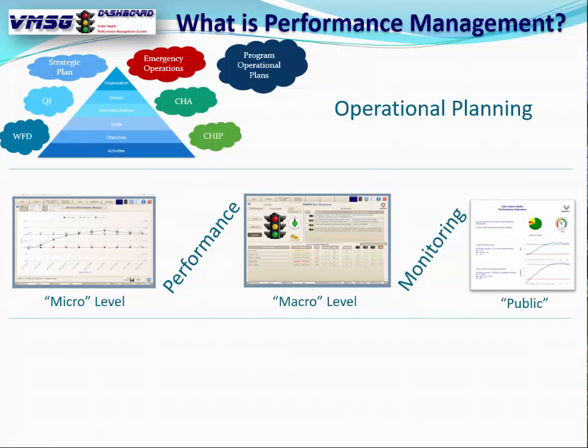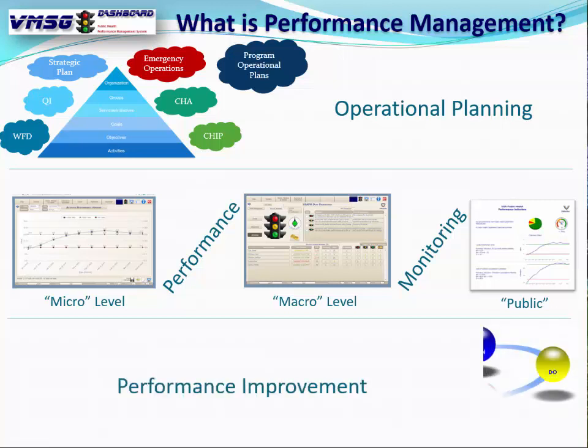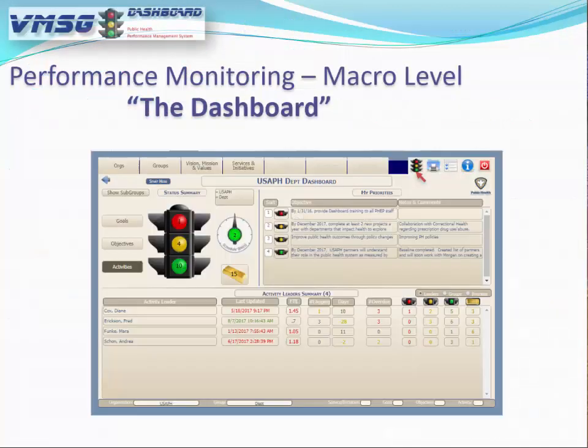There are a bunch of performance monitoring tools in the dashboard. During the execution of the plans, you'll be looking for anomalies, something to start heading south, or not meeting expectations. Once you see that, this is where the PDCA cycle comes in. Each plan is constantly moving through this cycle of planning, execution, monitoring, and making adjustments or corrections to the plans and/or resources, again, in real time.